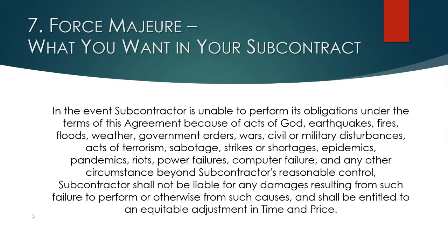Here's an example, and this is a rather broad and all-encompassing and I'd say favorable to a subcontractor. But before we dig into it, just the way courts look at force majeure clauses, I think that's important for you to understand, is they interpret them narrowly.